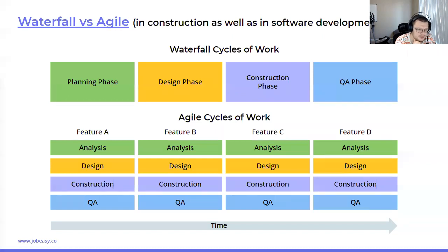So let's say if we had resources and we need to choose between agile and waterfall, it would be better to do waterfall. It will depend on the product. If you need to release for a government project an emergency call button for seniors, and you make sure it's fail safe, you go with waterfall because their life depends on the functionality of this device, and there are certain government guides and restrictions on how it should work, standards, and the same thing with healthcare, data security. So that would probably be a waterfall project. When it's released, it has to be super safe, following all the guidelines. We're talking about people's lives here. That's very important.